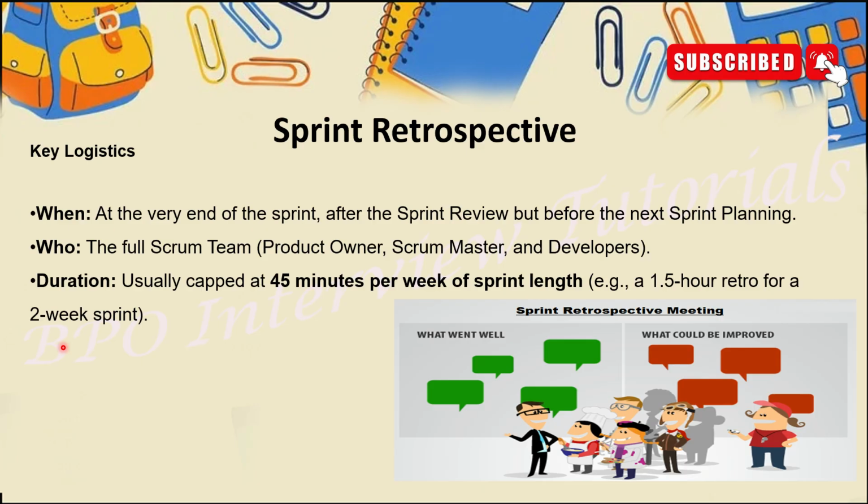For an example, I will give you a basic idea here. Suppose we completed one sprint. Okay, now what a scrum team will do, they will share a feedback form or something. They will share it with all the team members and ask them to fill out this form. They will mention all the information like what went well, everything. They will ask all the team members to fill that form, and post filling the form, post getting the observation, all will connect in one call, and they will discuss like, okay, this was the observation, this went well, this wasn't went well. In this way you can have a connect, guys. This is just a general example.